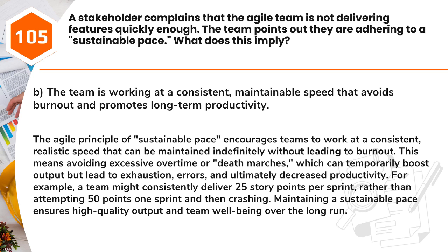For example, a team might consistently deliver 25 story points per sprint, rather than attempting 50 points one sprint and then crashing. Maintaining a sustainable pace ensures high-quality output and team well-being over the long run.